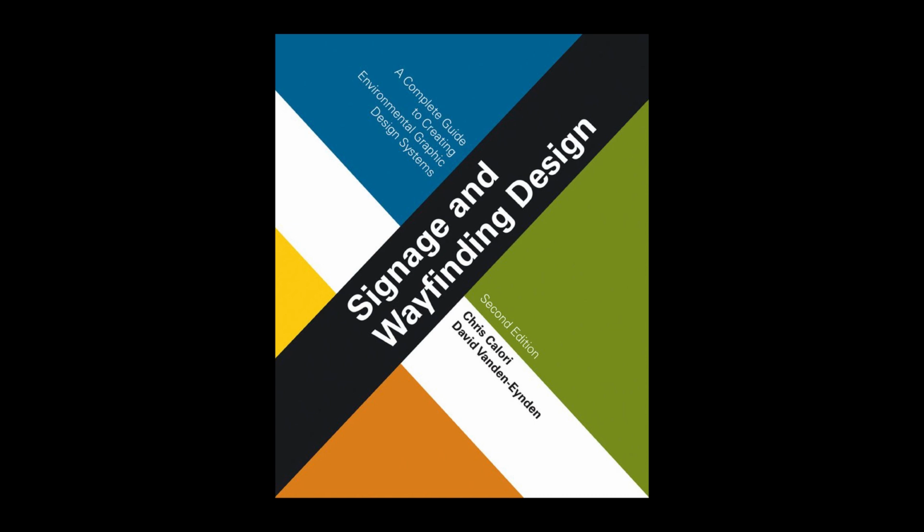Often, EG designers are brought into a project too late, but they can also be brought in too early, such as before floor plans are frozen or locked. That is, while the plans are still in a state of flux and sign locations cannot be pinned down. Ideally, the signage design process should lag behind the architectural design process by one or two phases.